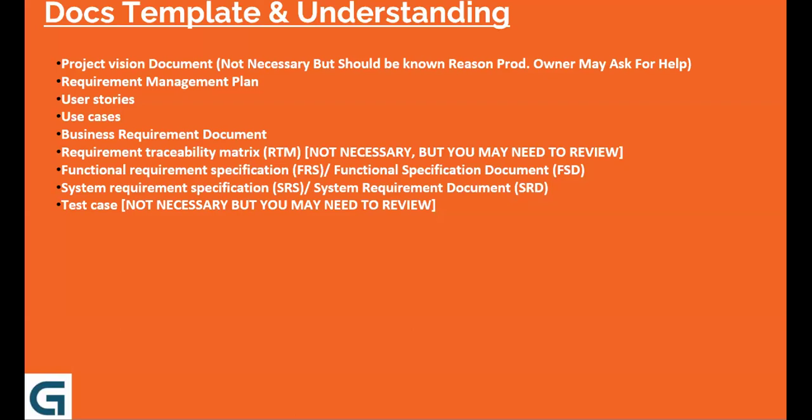BRD, requirement plan, definitely at the beginning. User stories and use cases are made simultaneously during the development, because you don't make them at the beginning. You make them as and when you start working on that particular area. Okay, I got it. Thank you very much for asking the question.